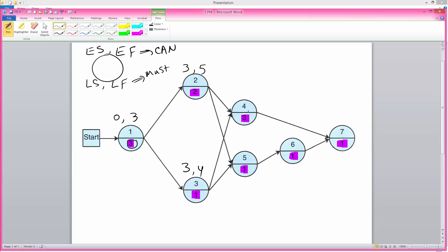For activity four there are two predecessors — activities two and three must both be finished. Activity two at the earliest can be finished in week five. So the earliest start time for activity four is week five.